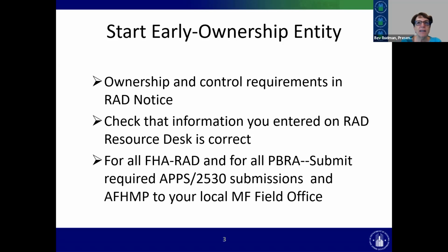The other item listed on the slide is not really related to ownership entity, but it is related to this idea that some processes need to occur in the multifamily field office, even though you also must finish it to close your RAD deal, or at least be on your way, for the Affordable Fair Housing Marketing Plan, which is the AFHMP. That also has a normal process where you submit to the field office and then it does have to go another place within HUD. But again, Office of Recap can't help you finish that process. You need to start it with the field office and follow up if you don't hear anything.